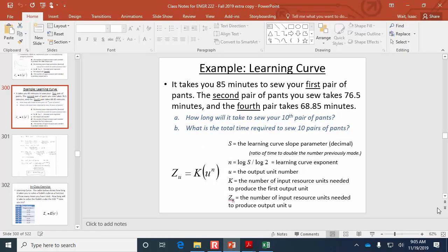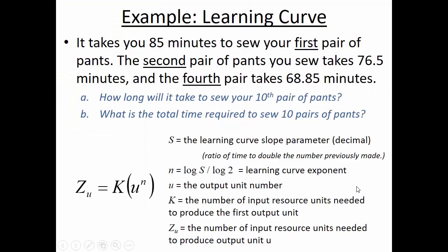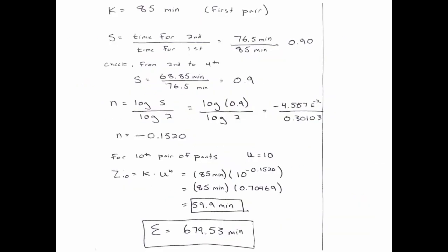All right, so that's the idea behind learning curve. And so why do you need to know this for cost estimation? It's because when you are getting people onto a job and you're trying to estimate their productivity, you have to keep in mind that as the job goes on, they'll get better at their respective tasks and may be able to complete work more quickly than they were the first time on the job site.